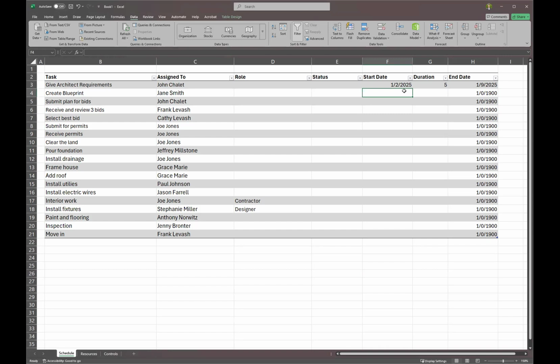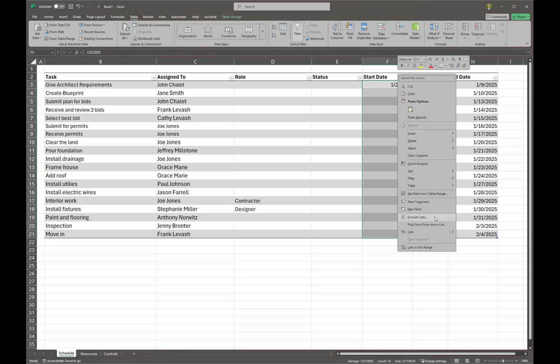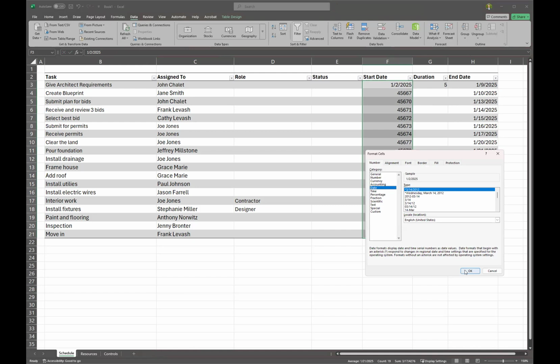Then what most project managers using Excel for project schedules do is use the workday again for the rest of the items in this column. You want it to start where the other date ended. And you probably want to add in one day because you want to start the next day. Okay, and then you can just pull this down like we've done before, and it'll adjust the formula. So if you look at the formula up here, now it's referencing H4. Now it's referencing H5. There are ways to stop that adjustment if you don't want it to happen, but in this case, we want it to happen, so it's good. And again, let's update the formatting to date.